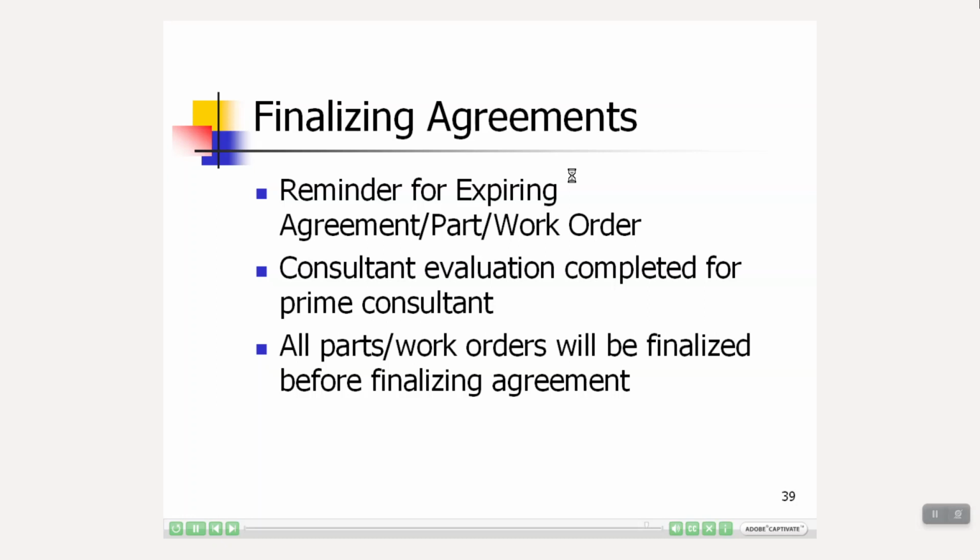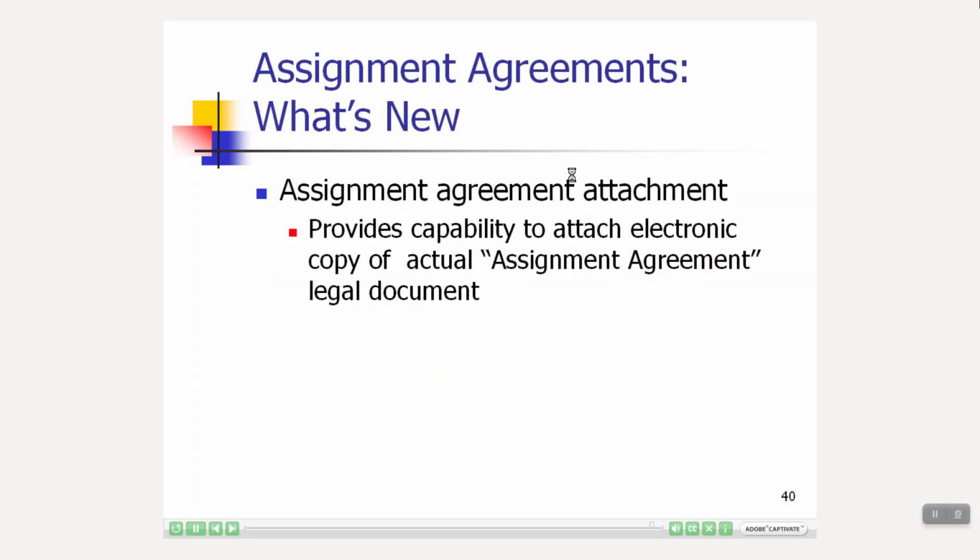Before an agreement will be finalized, the consultant evaluation must be completed for prime consultants, and all parts or work orders will be finalized before the agreement is finalized. One additional point here about what's new with agreements. There is a new assignment agreement attachment, which will provide capability to attach an electronic copy of an actual assignment agreement legal document.